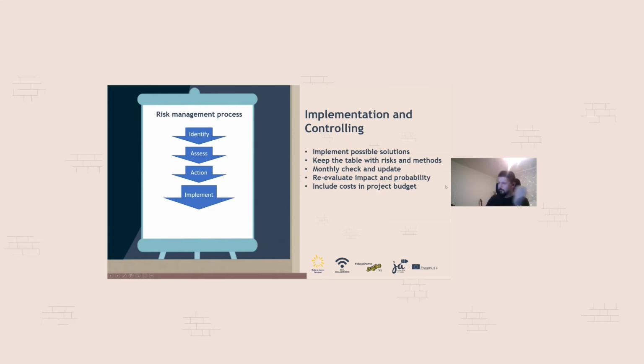If you have one facilitator during the project and he gets sick, you won't lose money, but you lose a human resource, which is a huge problem. So you need to have a backup plan. You need to have someone who can do it or help you out. Yeah, calculate with money and time reserves. So even if there is a probability that something will happen or take a little longer than it should, due to some of the risks, you need to calculate with that.